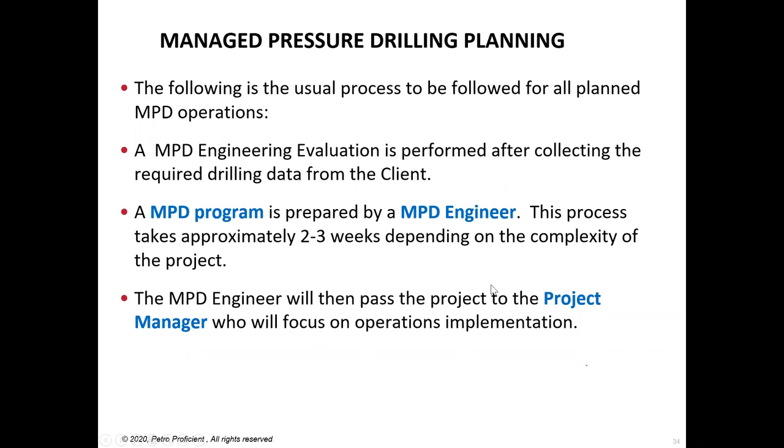Then the MPD engineer will pass on the MPD program to the project manager, MPD project manager, who will focus on implementation. So an MPD engineer will essentially decide what equipment he needs to use, what type of pipe work he needs, how much piping he will need, what type of RCD he will use, what type of choke manifold he will use, what would be the pressures in the well, what would be the pressure at the surface, and this will be in discussion with the client, of course, what kind of pressures you are going to apply, what are the limits, and then based on that, equipment will be decided, and then project manager will go identify the equipment, put it all together, and then prepare to mobilize it to the rig.